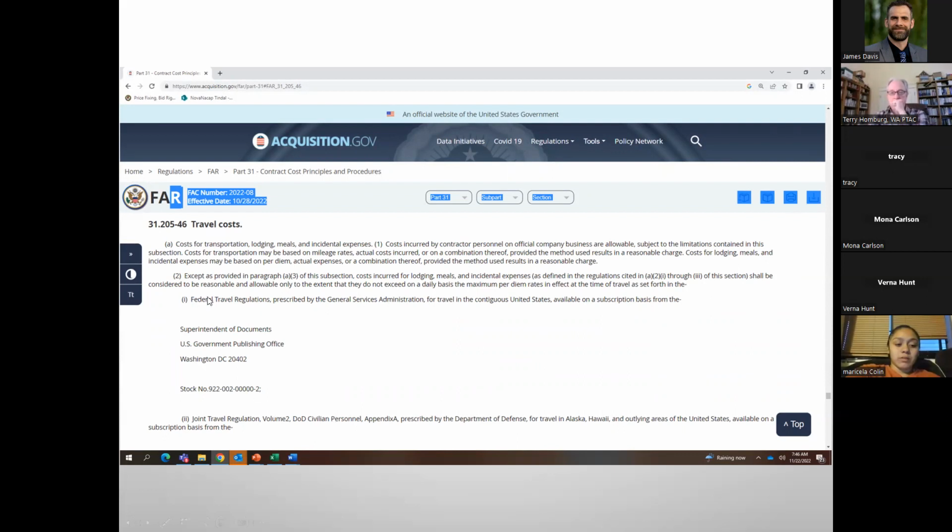Now, you may not include this. Don't forget that this is something that they may say also may be used for your, again, these are cost accounting standards, and these are the criteria that are what's allowed. They don't say that this has to be overhead or direct. So if you have travel for your employees, say you offer IT services, you're traveling to Chicago, I want to charge you direct because I would not be traveling to Chicago for this client if not for this project. So I'm going to charge all of my employees' travel expenses directly to the job. The government's going to say, I need to see that breakdown. If you didn't give them a price, you had to give them a cost proposal, which breaks down the cost.